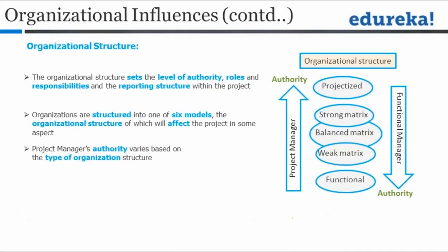There is a balanced matrix where we have the resources coming from the various functional departments. There is a project manager assigned, but the power of the project manager is not very strong. The project manager only gives inputs to the functional head for the appraisal situations.